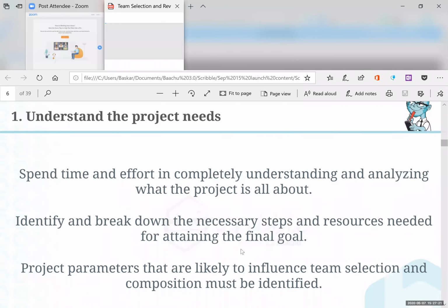in your own cycle, where this is the project time scale, it just goes up. Then you have your own time scale of managing the stakeholders that goes up. The brilliant leaders realize they just allocate the proposal to a proposal person. They allocate the internal bid governance, working with the customer, to the bid manager, and all the bid leader does is two things. He manages his senior managers, and he also manages the customer, and the rest of it, he allocates. He creates his own org structure, and he passes that to the bid manager.